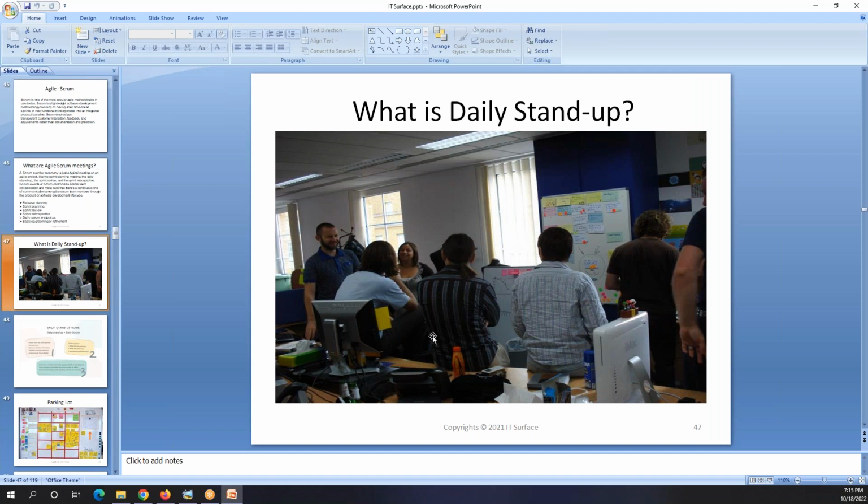Can anyone tell me what the three questions are that they have to answer in daily stand-up? What you did yesterday, what you are going to do today, and what will be your plan for tomorrow? You are right on two, not the last one. What you did yesterday, what you are going to do today, and is there a roadblock or blocker? Yes, is there something stopping you from doing your work? So three questions you have to answer here.